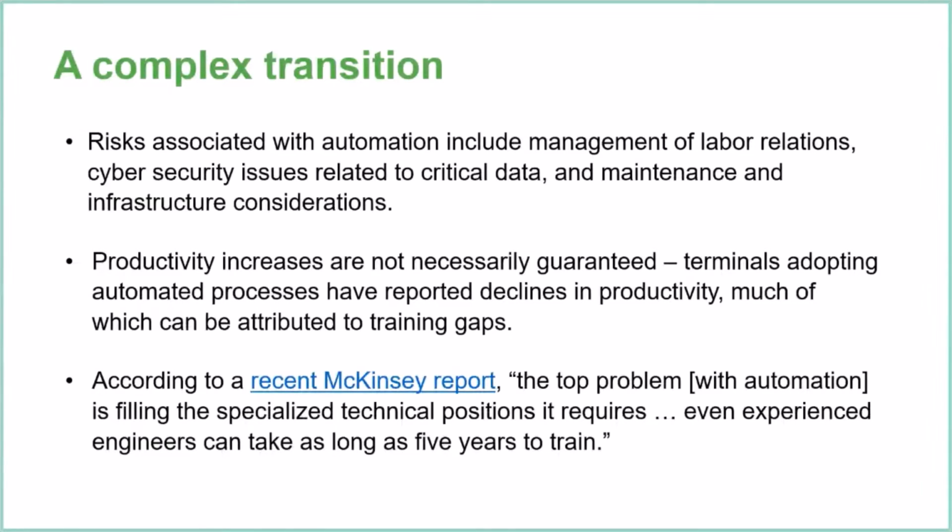In recent years, suppliers such as MarCrane have also jumped into that complete system solution with their TOS and equipment control systems. And when we did the procurement a few years back for the Ashdod container terminal at TIL, we were the first one to actually demand one contract from the equipment supplier.